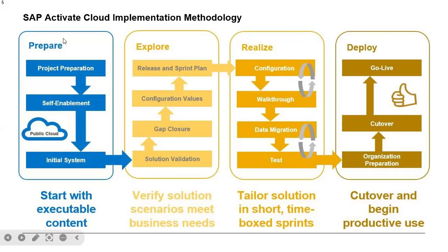In the preparation, as a project manager, they will prepare the kickoff meetings. They will explain to the client the project plan and the things which we are covering during these three months. From the first month we will do the workshop, second month the configuration, third month the testing. In the preparation phase, your responsibility or your KRA is the preparation of the PPTs. If you are from Employee Central core, you need to prepare the PPTs on how you will gather the information from the client.